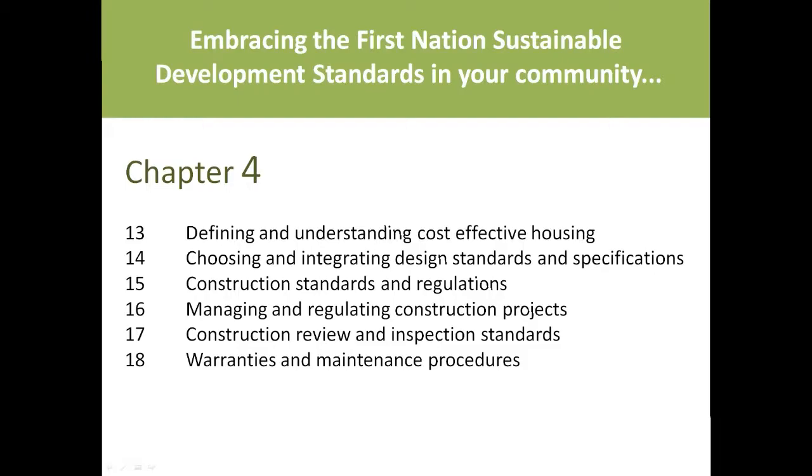contract. You don't have to reinvent the construction contract. There are plenty of them out there now, and there are some that are designed more neutrally, if you wish, designed for the construction industry. Talk about CCDC2 type contracts or CCDC type contracts. And then just having proper construction review. In Chapter 2, we talk about making sure that you have building inspectors that are qualified and there's a process in place for them to inspect and provide inspection reports, et cetera. In Chapter 4, we're talking about really what should that inspection report include, what equipment should the inspectors have, when should they inspect, at what stages of construction, et cetera.